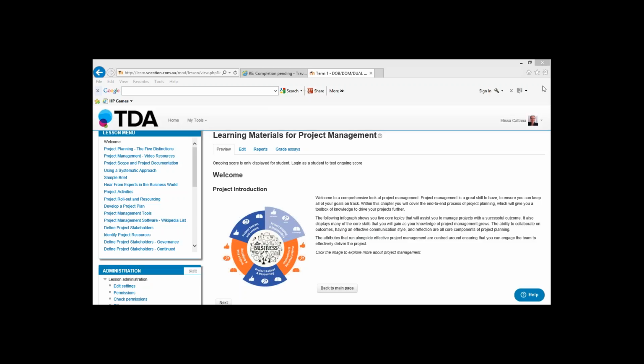Essentially, my role was to check the requirements of the business that I worked for were being met. So part of my role was to take a document. This is actually a document which is part of scoping or the initial phase of a project, so it's a good thing to mention now. It was called the Functional Requirements Document. Essentially, the Functional Requirements Document was a document that my company developed and said, these are all the things that we need the telephone to be able to do. It was really like a big checklist of things that we needed the developers to deliver on.